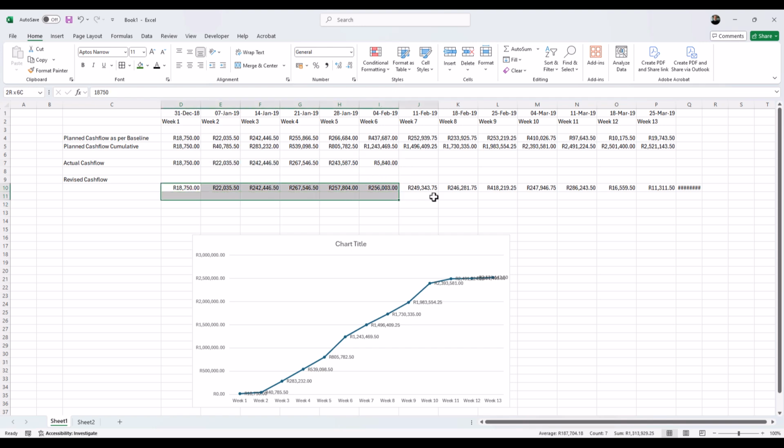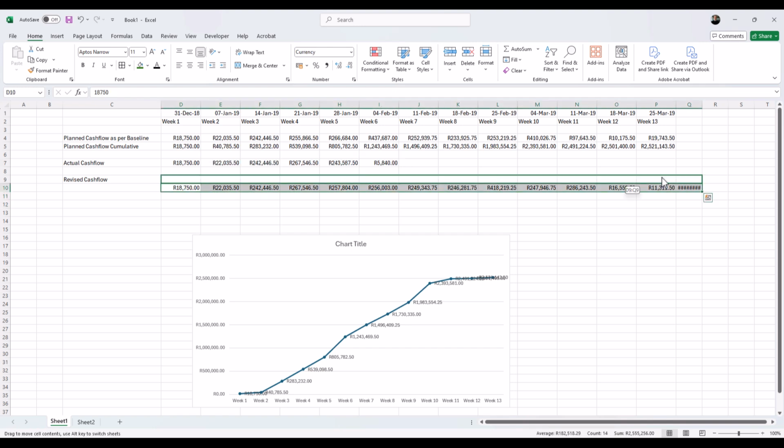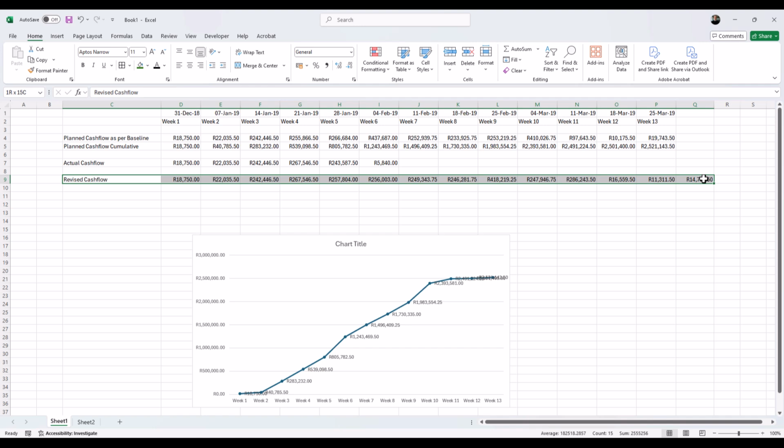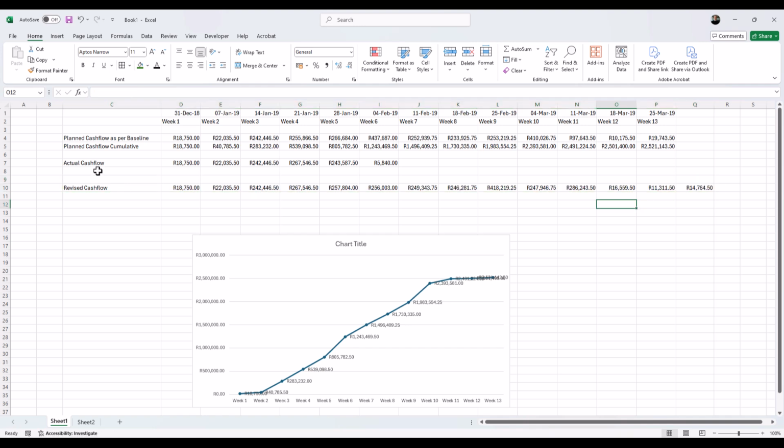There's also values. You do have cumulative cost value, and you do have an earned value actual cost of work performed, which is actually also cumulative. So if you want to use those values, you're welcome to. Then you don't have to do the conversion into cumulative values, but I sometimes do this because I want to see both. I want to see my monthly or weekly, and I want to see the cumulative value. All right, so let's just copy this.